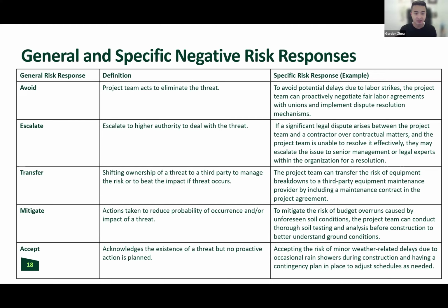Mitigation. And then lastly, accept. Accepting is basically accepting that the risk exists and you're not going to do anything about it. So for example, weather. I accept that we live in an earthquake zone here in Vancouver. And you may say, hey, the fact that we live here, we've accepted that risk ourselves. We've accepted the fact that I live in an earthquake zone and there's not much I'm going to do about it. That's accepting the risk.